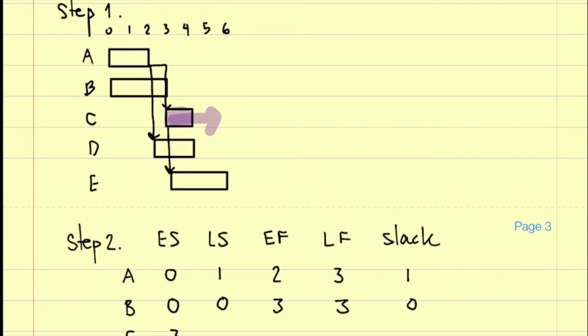So, can I delay C without delaying the overall performance? And if yes, how much? No, you keep it. 5. All right, so instead of starting in 3, it would start at 5, right?